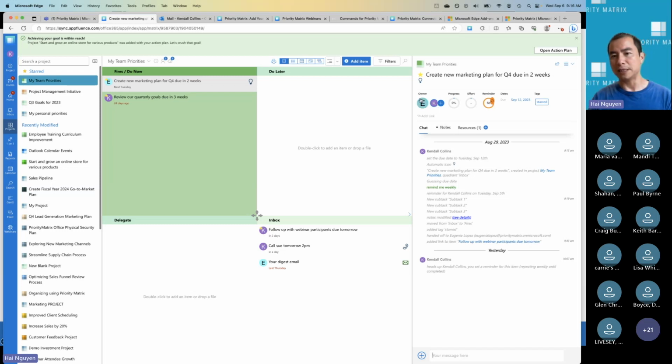And so here you can see how Eugenia is actually the owner of this task, and I'm a follower. So what does a follower mean? It means I get updates. If this task is updated or completed or progress is made, I'll get notifications and alerts that there's progress here and I can go and review it. So if I was a manager and I'm assigning someone a task, I automatically get added as a follower. So then when that task gets finished, you'll know, and vice versa. So there can only be one owner for that reason, because you want clear responsibilities.